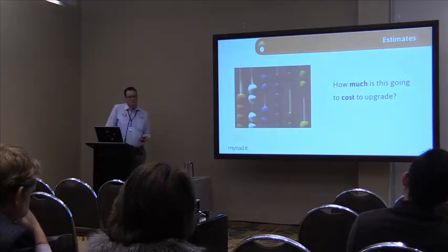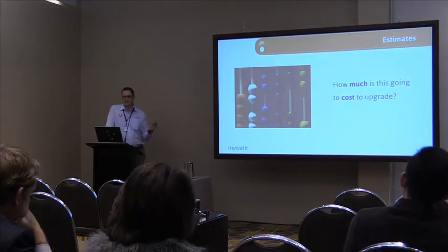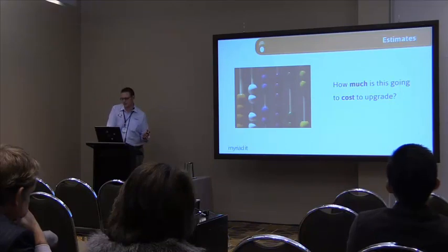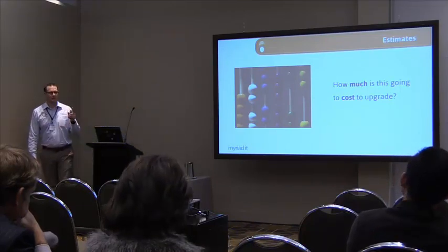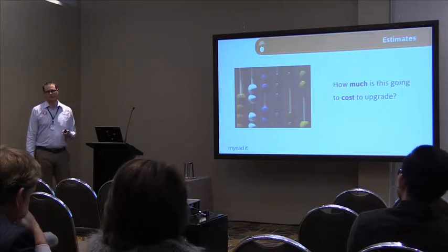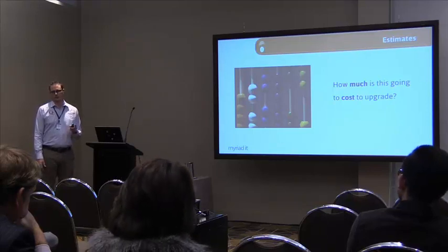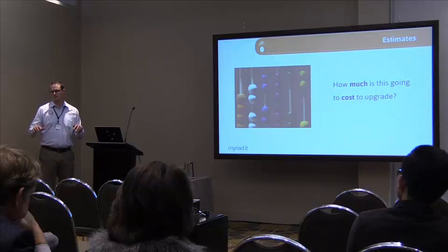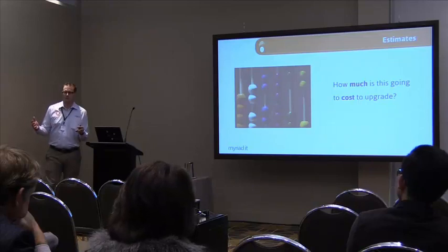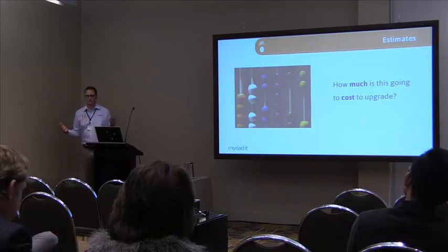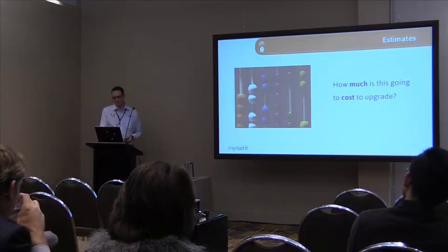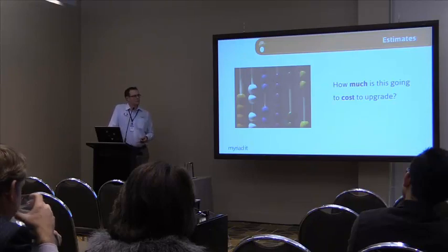And then the last one is obviously the estimate. How long is it going to take? How much is it going to cost me? Identifying those two things, plus contingency. People go, okay, my upgrade's going to cost me $250,000. I've got it fixed. Sorted. But there's always a chance that something may come up, so always give yourself a little bit of room and have that contingency in there.